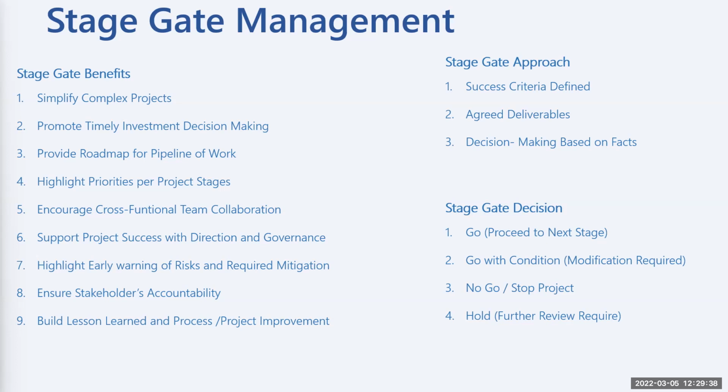And then the decisions. There are a few decisions that happen during stage gates. Some of them could go like, yeah, go ahead with the project to the next phase. That means those ones have done everything that is required and have been validated by an external peer review team to say, yes, this project is okay, is on board, is delivering what is expected.